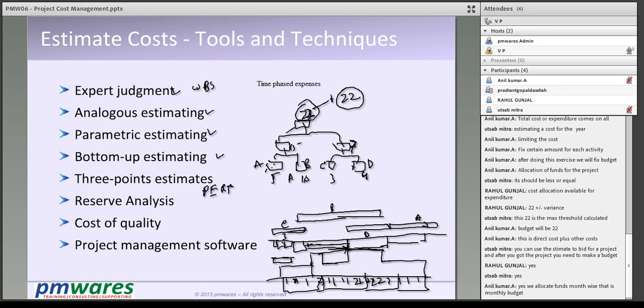But now when I decide how this 50,000 will be spent, like 3,000 will go for milk, 5,000 will go for fruits, 4,000 will go for vegetables, 10,000 will go for children's educations, 5,000 will go for traveling. Once you put for these activities that how much money will go, and this you draw a plan for that how this money will be spent in what head, then you have a budget. Otherwise, if you don't have this plan, you don't have a budget, you have an allocation.